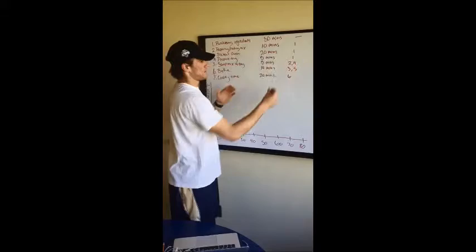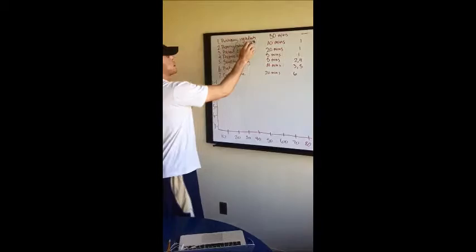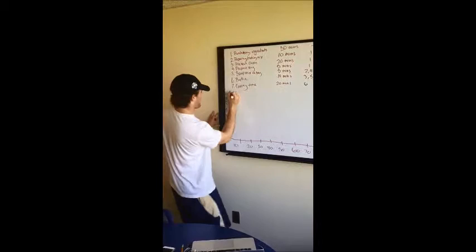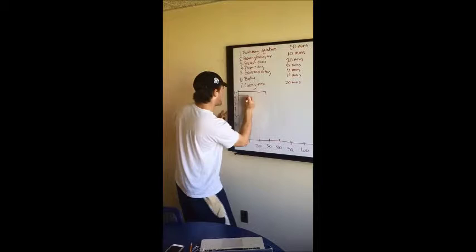So our first step is purchasing the ingredients. It takes 30 minutes. And there's nothing before making brownies than purchasing ingredients. So we're going to start that with one and that takes 30 minutes. So we're going to go from zero to 30. And there's 30. So that's to 30, zero to 30.